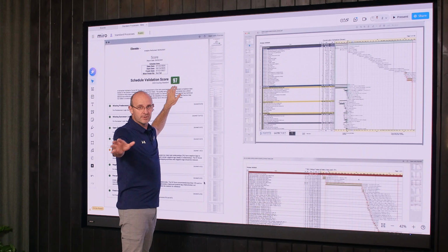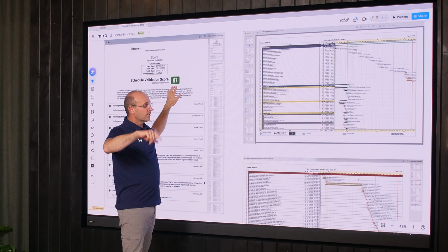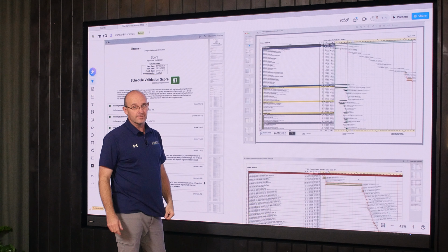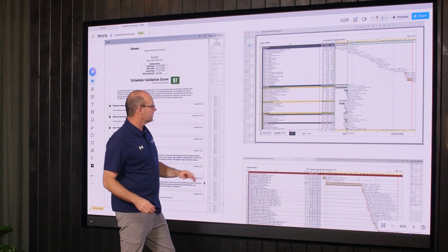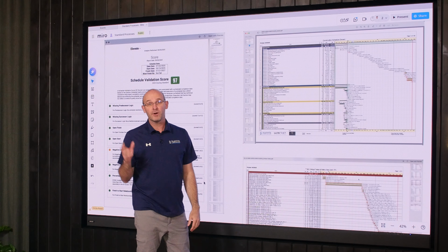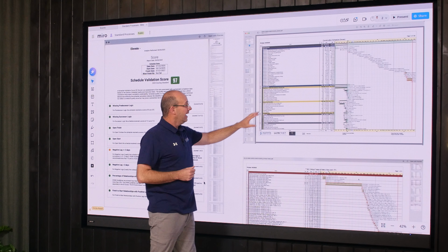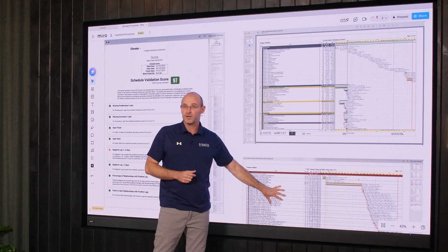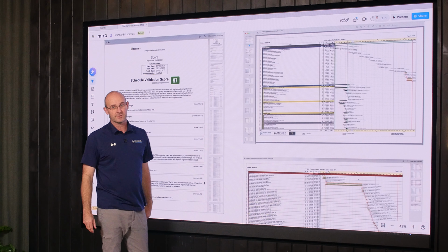The CPM export is automatically compliant according to the DCMA 14-point check and any other scheduling requirements and standards in the industry. Your scheduling department and legal team will be happy with it, and you'll get your full-blown CPM export, and you can filter out your critical path, anything you want based on that.